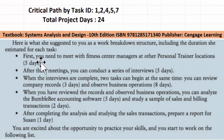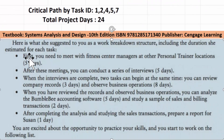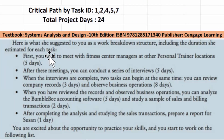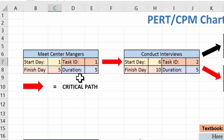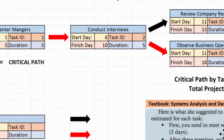In this textbook there's a personal trainer case study. The first task is to meet with fitness center managers and personal trainers. I've created task ID number one, titled 'meet center managers,' and it starts on day one. Counting on my fingers: days one through five gives us a five-day duration, finishing on day five.